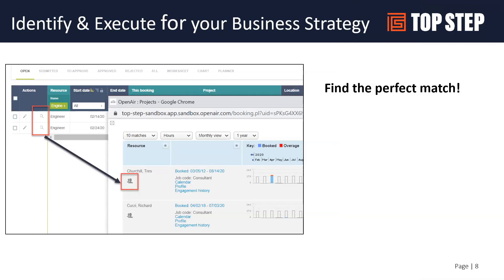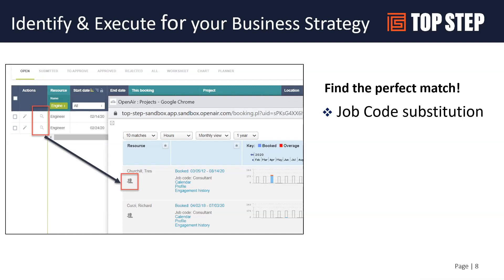Once you create generic bookings, there are a few ways to convert those into named resources. As I mentioned, you can use job codes to do a substitution. As long as your generics have job codes and your users share the same job codes, you can come into the bookings list view, select the magnifying glass on a booking, and it will bring up a substitute page showing all resources that match that job code along with their availability based on the booking dates. A quick way to say, I need an engineer — let me look at all my engineers, see who's the best fit, and click the icon to do a swap of the generic for the named resource.